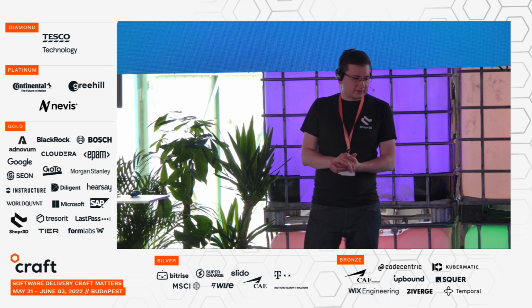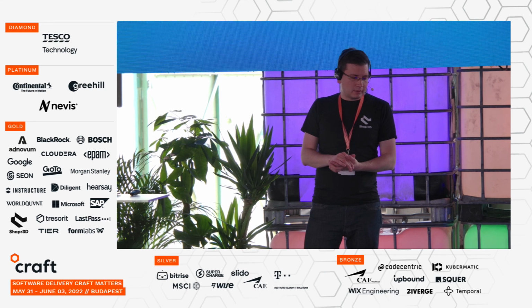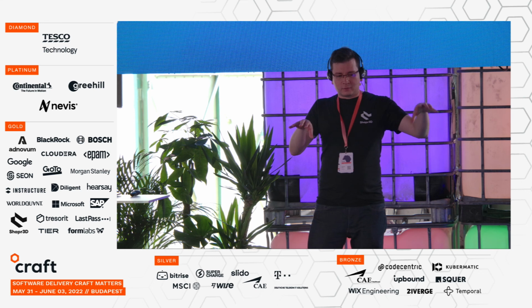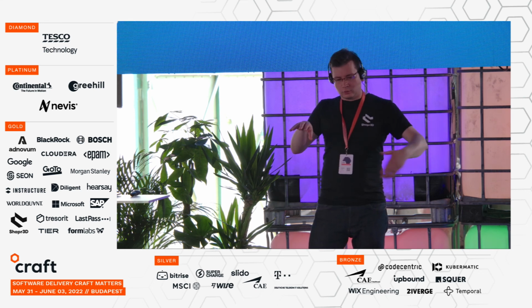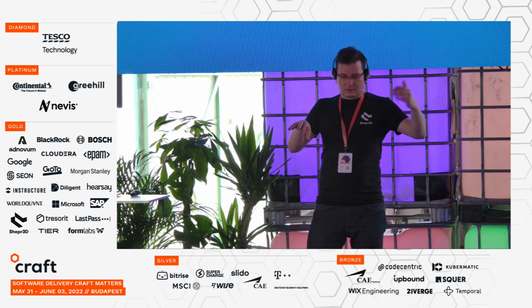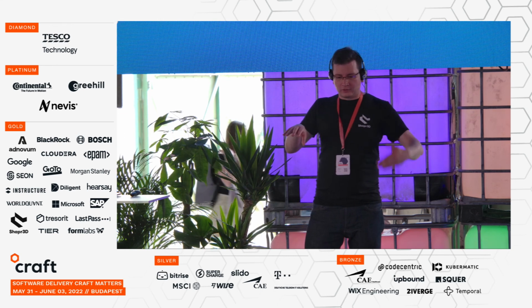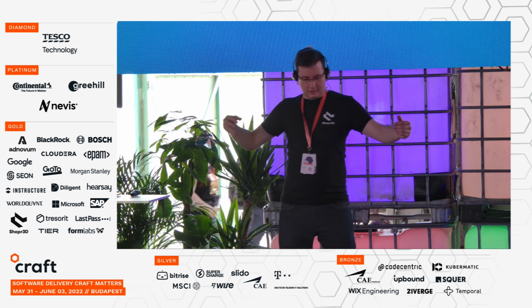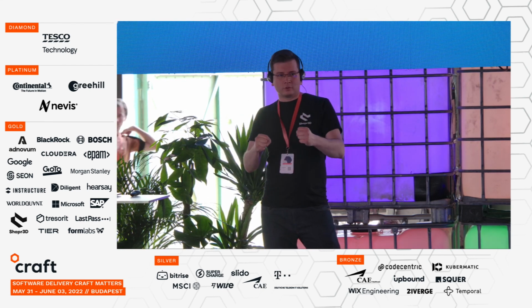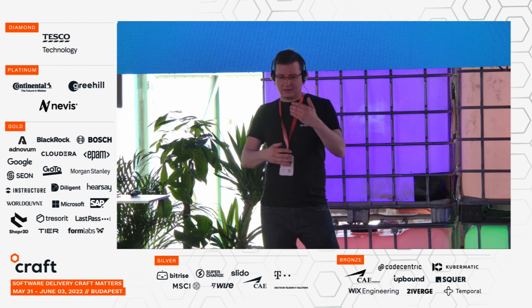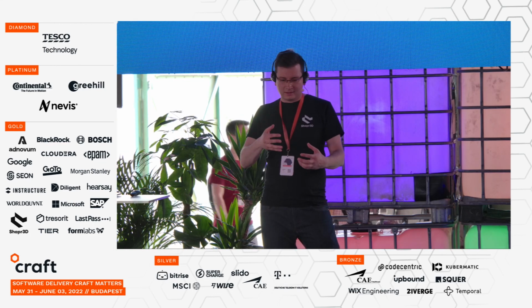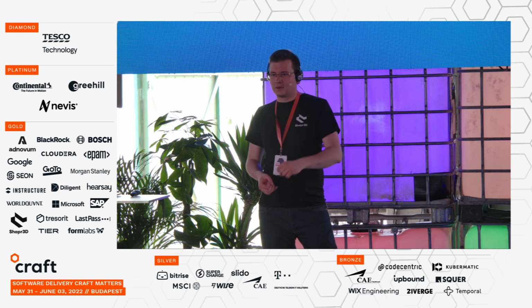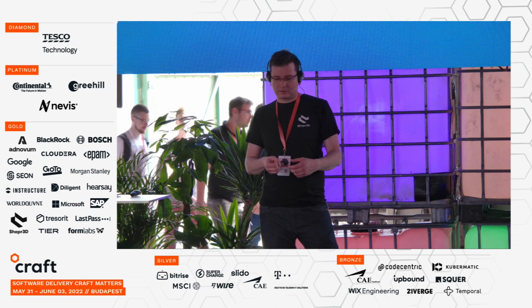And maybe another example of a team process: we established a weekly cross-functional team sync, beside the weekly planning. The way we generally do features in Shapr3D is through a planning process for engineering and a separate product design planning process. What we did instead was put all these different functions together in a room on a weekly cadence to think and rethink the whole feature and see how we can make this even better. What do we need to skip? What do we need to ditch? What do we need to bring in? What issues have we uncovered during the last month?